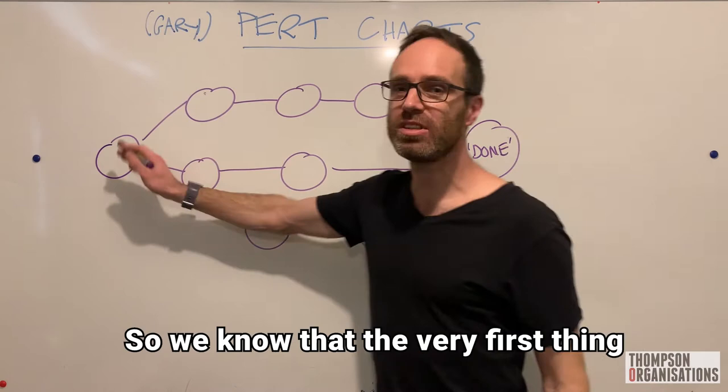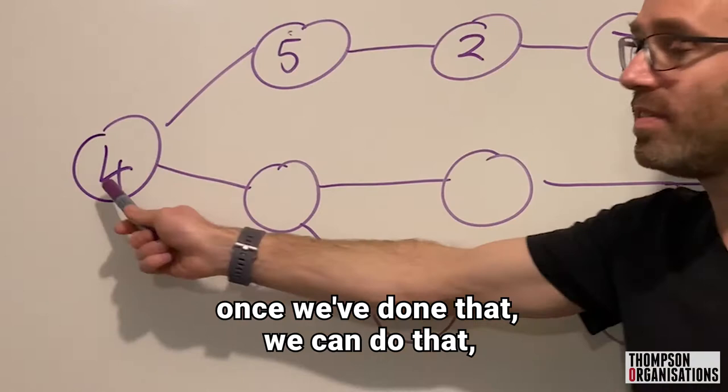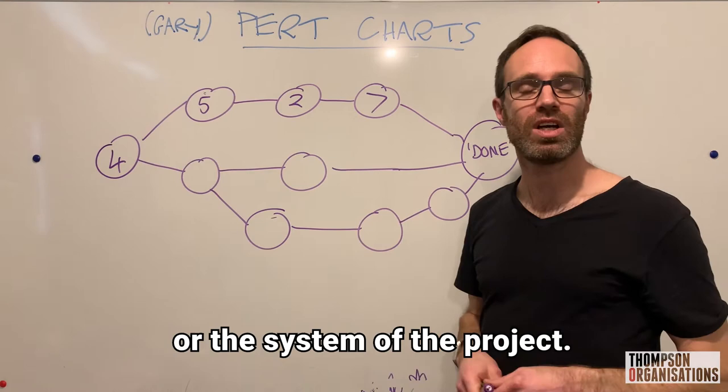So we know that the very first thing we need to do on the project is this thing over here. And then what we know is that this one's going to take five days. This one's going to take two days. That one's going to take seven days. So what this represents is once we've done that, we can do that, but there's nothing stopping us starting this task as well. But we can't start this task or this task until we've done that task. So you see how it sets up the overall picture or the system of the project.